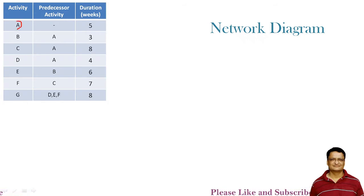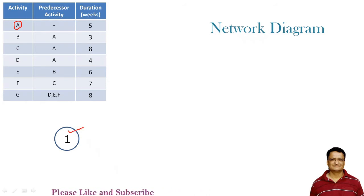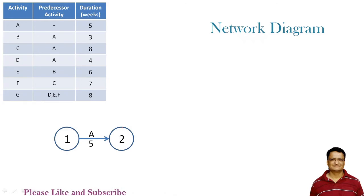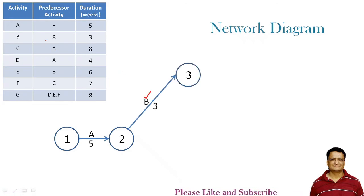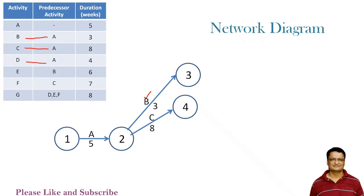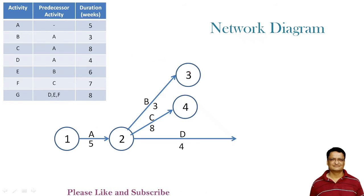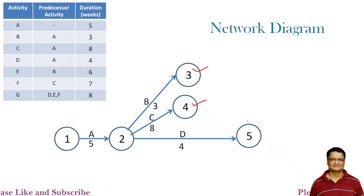The first activity is activity A, which starts from event 1. Since activity A has no precedence — it is the starting activity — it emerges from event 1 and completes at event 2. From event 2, activities B, C, and D will emerge because all three are dependent on A. So there will be three activities coming out of event 2. These lead to event number 3, event number 4, and event number 5.